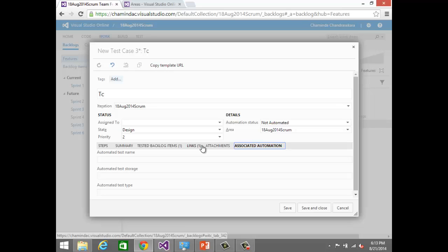Then the level of explanation of the bug or the user story would be test cases, because in a practical example you will have a user story, you will implement it, and you will release it to QA, so QA would be testing. And if they find a bug, they will immediately activate the user story again and maybe create a bug and give it to you.